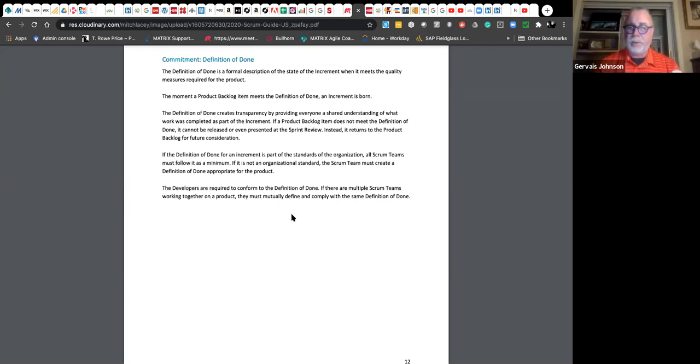Yes, I think the problem ensues when my definition of done across multiple teams impacts how I have to do the merge of my code and the testing of my code so I can deploy it. So if this team's definition of done is not completing certain things, and my definition of done is more complete and running things through Sonar and everything else and coverage, and it has to be 3 levels of testing, and these people only have to do unit testing, and I have to merge the code and then deploy it and do end-to-end testing, that's going to be a problem. You follow me? Because one team's definition of done is not at the same level as the other team's. Does that make sense? Yeah, no answer. So I confused people.